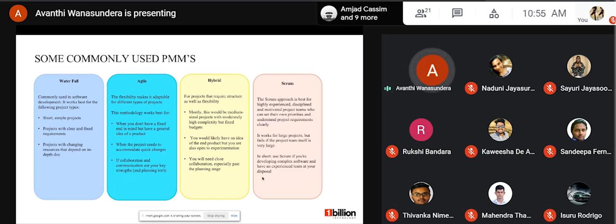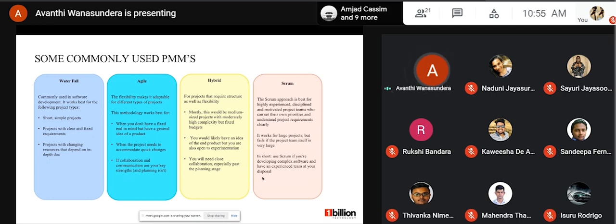The Critical Chain Project Management methodology, or CCPM, works best in environments where resources are devoted to a single project. If you have a dedicated team for a project, it works great. If your team is constantly overworked or missing deadlines, the CCPM methodology might be the right fit — as long as you are not sharing your resources with other projects or other work.